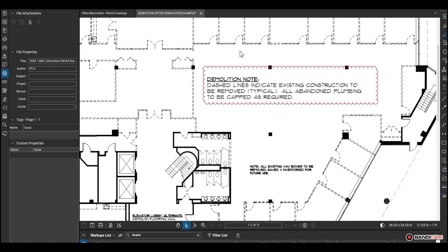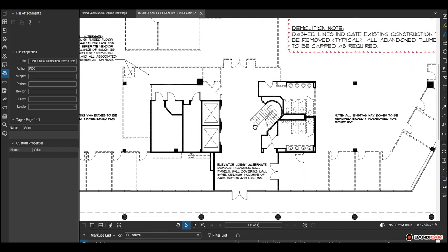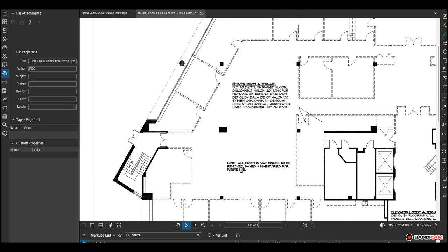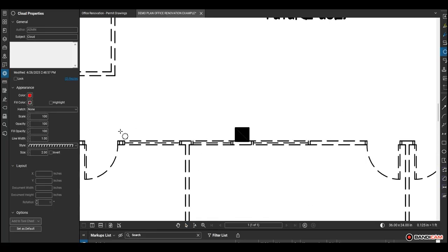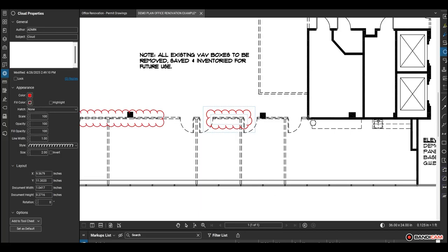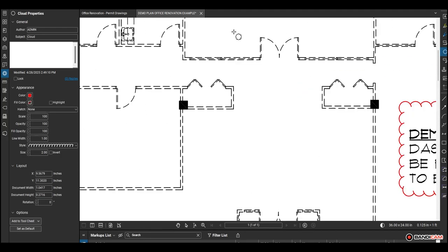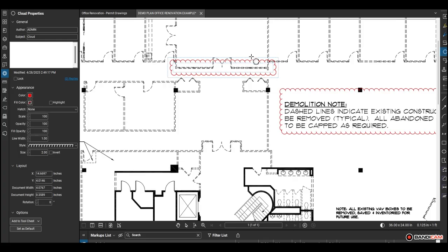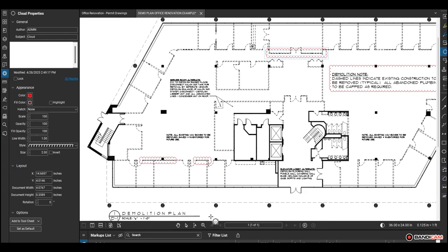Just to give some context, walls are metal stud and 5/8 drywall to 10 foot high, which is above the acoustical ceiling height of 9 foot. There are many aluminum glazing systems along the offices, shown as a dashed line in the middle of the partition to be removed, and we can assume they are from finished floor to 8 foot high, followed by a 2 foot high section of drywall partition to top of wall.